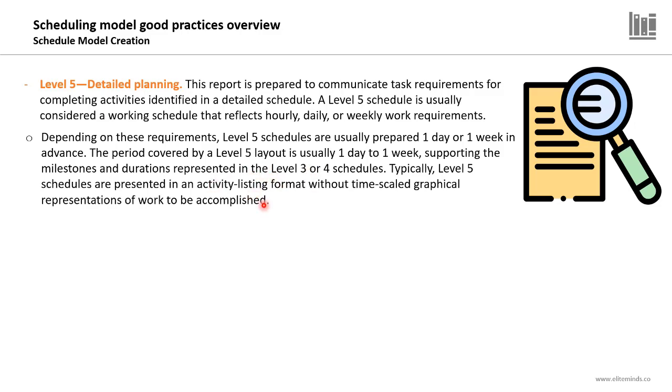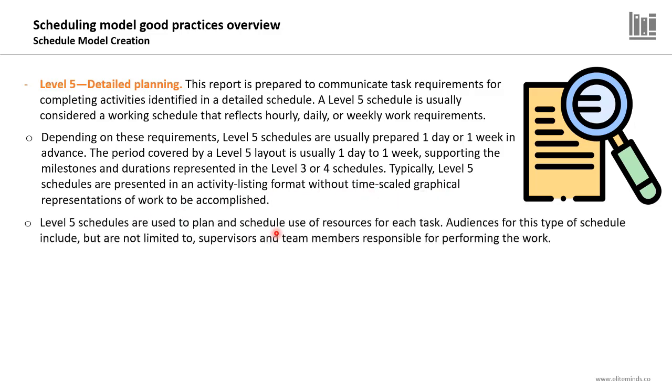It's the most text-heavy format of the levels, without time-scaled graphical representations of work to be accomplished. The level 5 schedules are used to plan the use of resources for each task. Audiences include supervisors and team members responsible for performing the work. So usually level 5 is presented to the working teams.